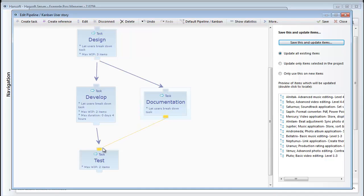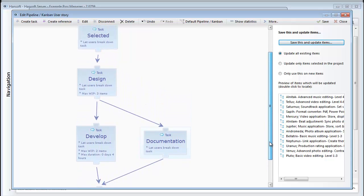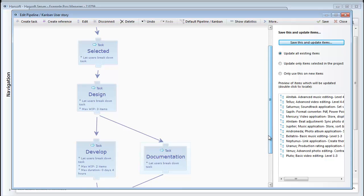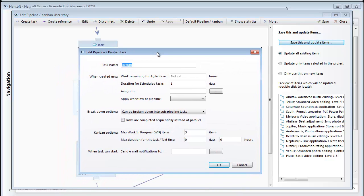When defining these process steps you have the possibility to automate a number of things here just to make sure that you keep the admin work for your users to an absolute minimum. Let's say for example that we know there's a specific person who always will be responsible for the design and we want all the items that we work on to show up in his or her to-do list when they're ready for the design step.